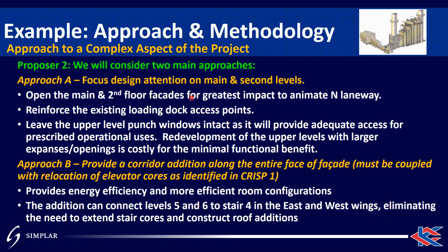Now, another approach that we're going to consider is adding a whole corridor along the face of the facade on the north side. Now, this must be coupled with a relocation of the elevator cores. We've identified this as a concern in their other submittal forms. So you can link this with the other submittal forms, in this case, submittal form E, the CRISP responses, that there's a concern with the elevator relocation. We might have to do it.